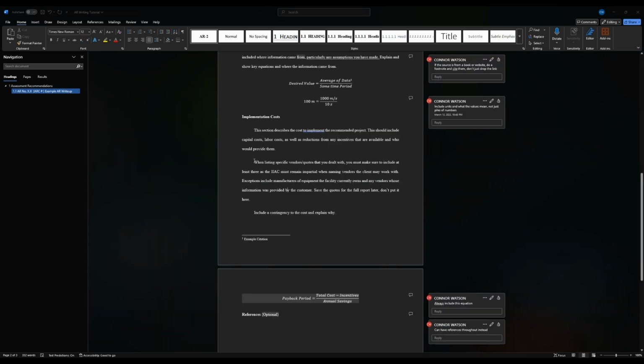As far as quotes go, we have two notable rules that we like to follow. If you're going to get one quote, we really prefer that you try to get two or three. This is obviously good for the accuracy of the quote, but it also keeps us impartial with different companies.